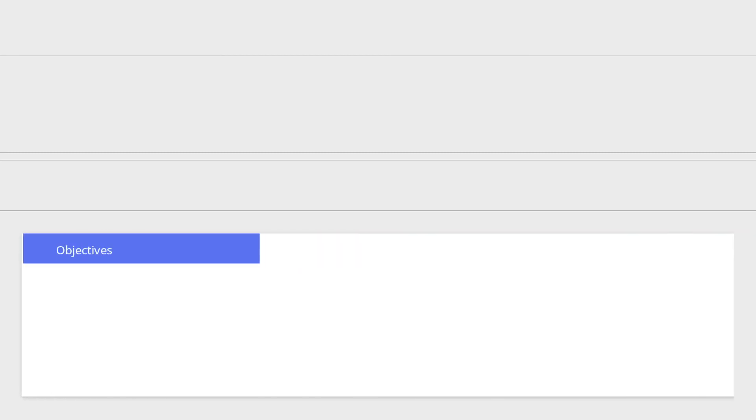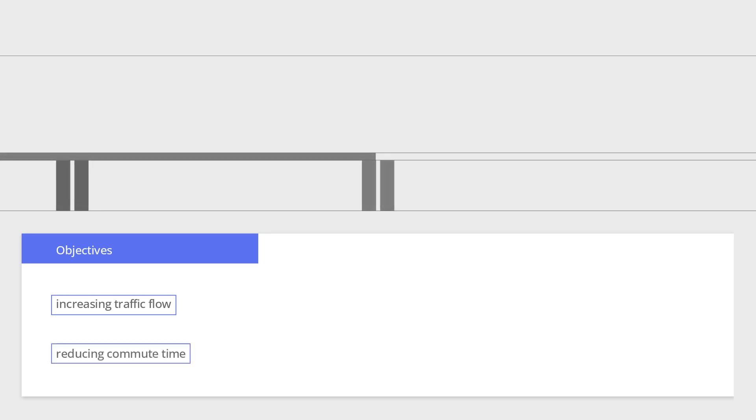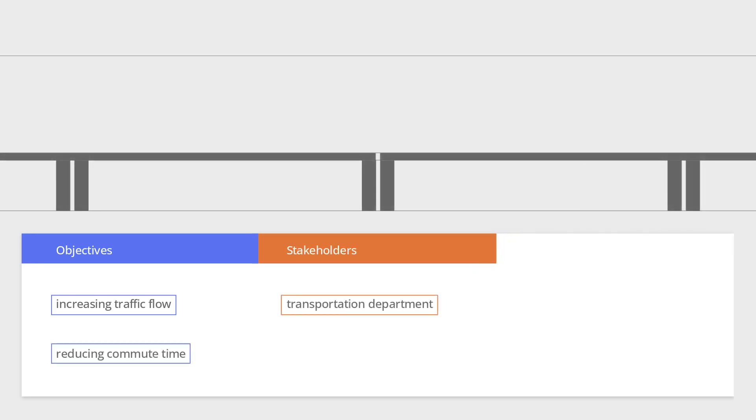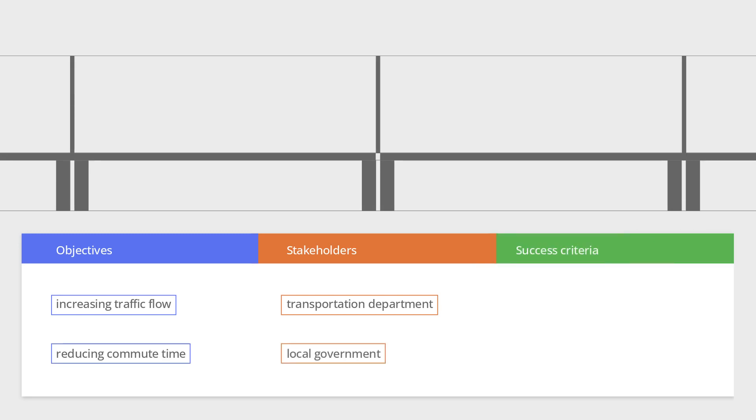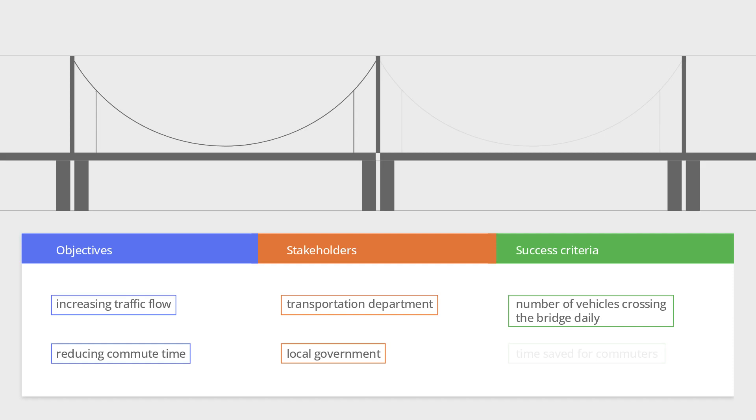Let's look at an example of a project charter for building a new bridge. The project charter would include objectives such as increasing traffic flow and reducing commute time, stakeholders like the transportation department and local government, and success criteria like the number of vehicles crossing the bridge daily and time saved for commuters.